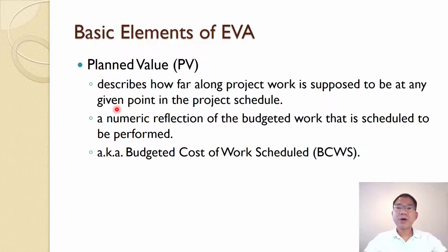And that is a numeric reflection of the budget work that is scheduled to be performed. So it's budget work, so it means that it measures the money involved for the work that is scheduled to be performed. So you plan to perform, as of, let's see, after 5 months, that much work based on your schedule. So that is plan value. It is measured by the budget, measured by the money.